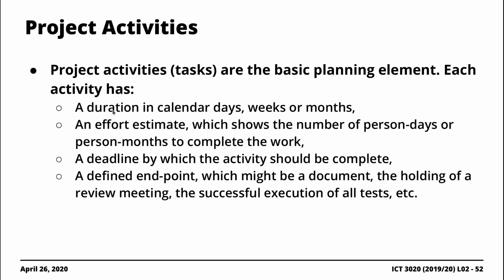Okay, the other thing you need to remember here is that you typically need to associate effort with these different activities, right? And the effort is normally represented in person days associated with that work package or work unit. So how many person days are going to be needed to accomplish the task? You also specify things like deadlines associated with different activities. And you define really the endpoints, right? These endpoints are activities typically conducted on a single date or period of time. These would be milestones, by the way, things like regularly scheduled meetings. It's a milestone because it marks an end point of an activity.